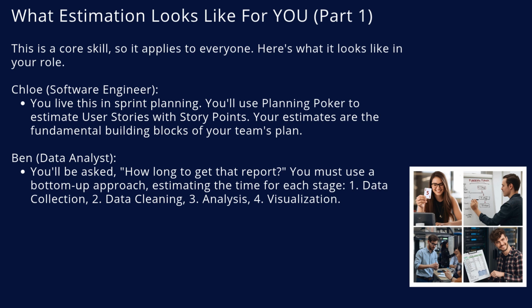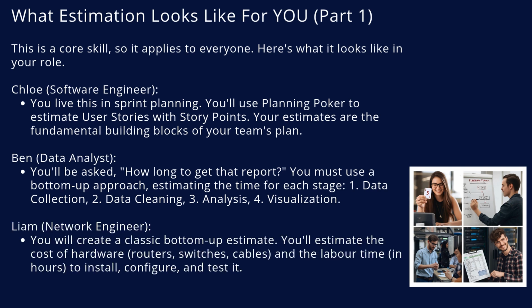You estimate the stages. And for Liam, our network engineer, your role is a classic, perfect example of bottom-up estimation. You'll be asked to plan an office network upgrade. You will create a detailed plan listing the cost of every single switch, router, and cable, and the labor time in hours required to install and configure each one.